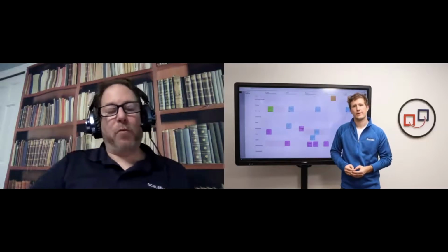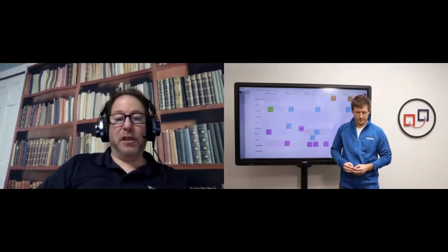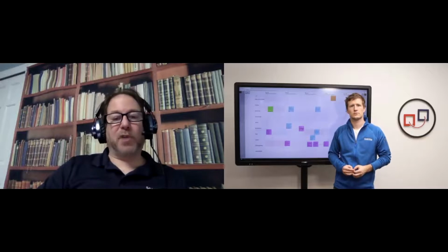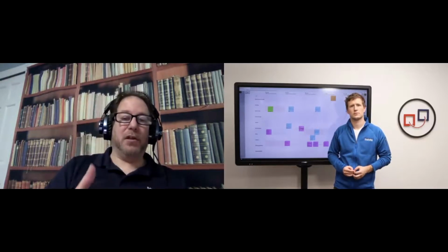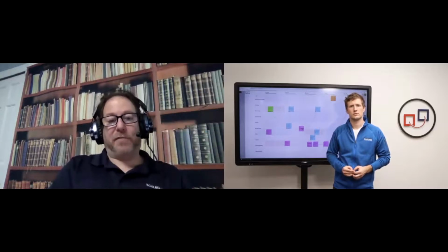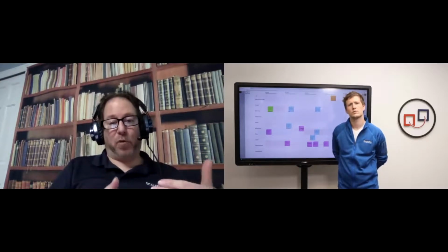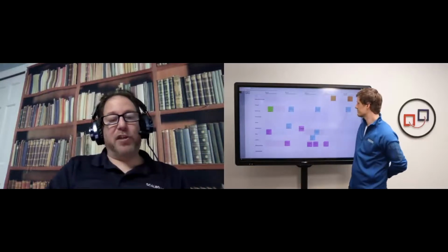Yes, so we're using the program board during our Scrum of Scrums. We'll hold that sometimes once a week, sometimes twice a week, or even more often, depending on the situation. And we're making sure that in each and every iteration, when there are these collaboration points or dependencies, that is actually happening between the teams. Are there any impediments between the two teams working together and what we can solve? And so we're continually looking at that.